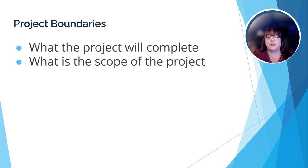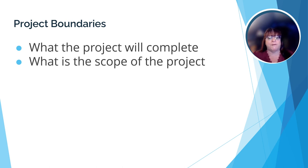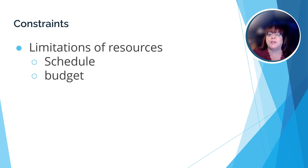Boundaries refer to the scope of work that the project will and will not complete. It's important to identify the work that is within the scope or boundaries of the project, as well as clearly identify any work that will be considered out of the boundaries of the project. Think of a boundary as meaning that all of the work identified within the boundary will be included in the project, and anything outside of the boundary will not. Constraints refer to the limitations of resources a project must work within, typically schedule and budget.